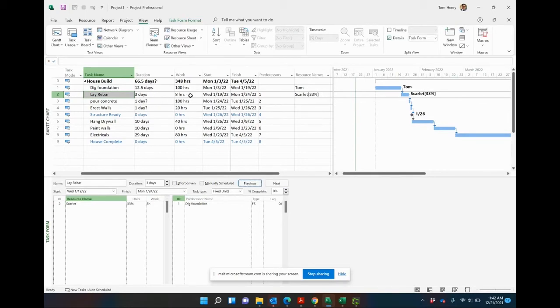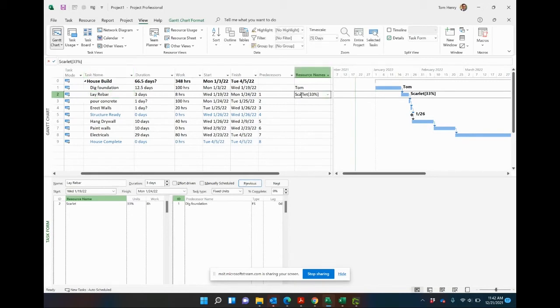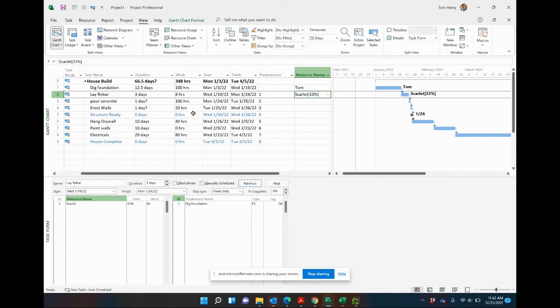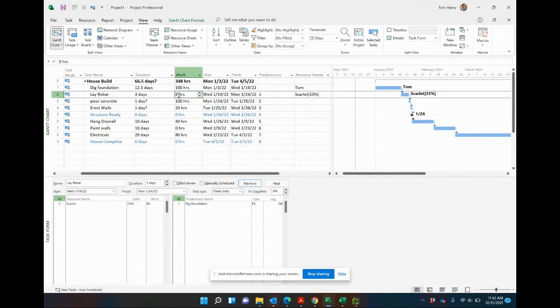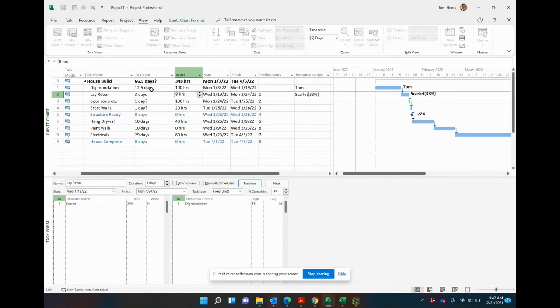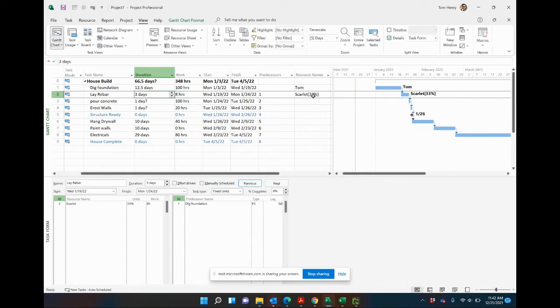Only eight hours of work though, she is now working 33 percent. Essentially she's working part-time at 33 percent of a typical working day. As you come in and estimate the work and the duration, well the duration and the work, in addition to that you can get more granular and you can see these calculations taking place. Rather than having a three-day task and by default it assigned that resource at 100 percent units, therefore it would have been 24 hours work as opposed to three. But because we've estimated the work, we've estimated the duration, Microsoft Project calculates the units for us for Scarlet.